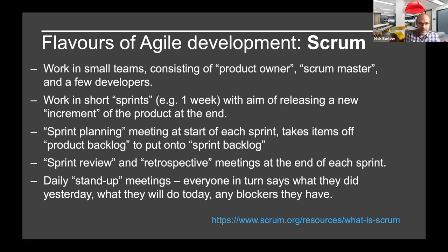And then within the sprint, you also have a daily stand-up meeting. Ideally, if you're going to follow the prescription, everyone stands up in a circle, but in the modern world, it'll quite often be virtual. They're very short. They're run by the Scrum Master. And in principle, everyone just answers three questions. They say what they did yesterday, what they're going to do today, and what blockers they have, which are preventing them doing what they want to be doing today. So it should be a very, very short meeting, but it happens every day. So that's Scrum.